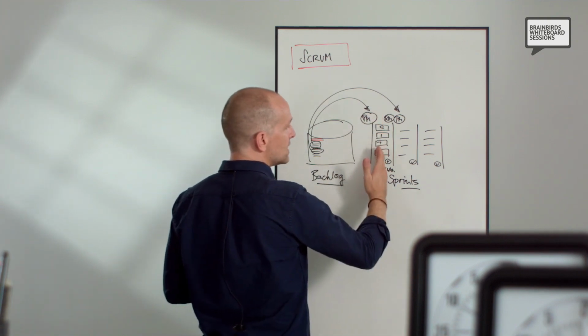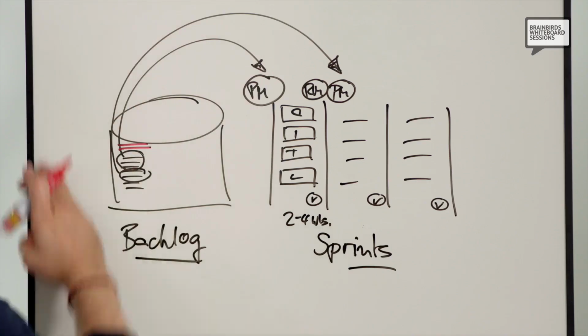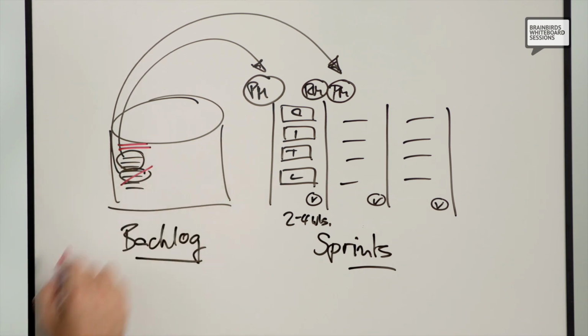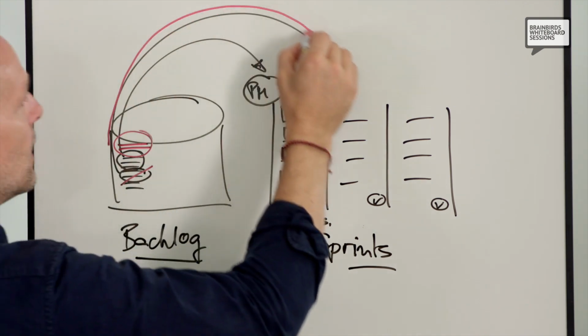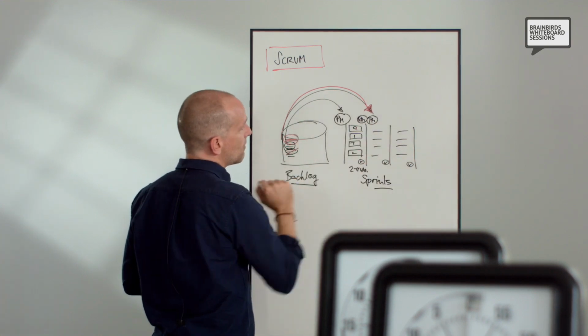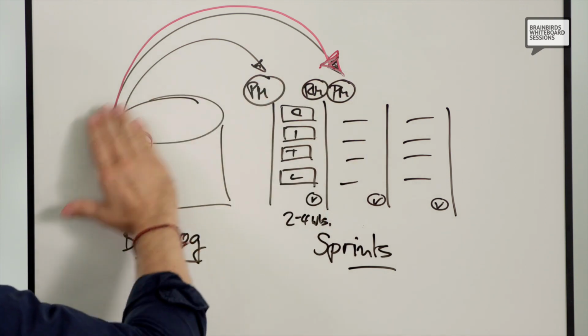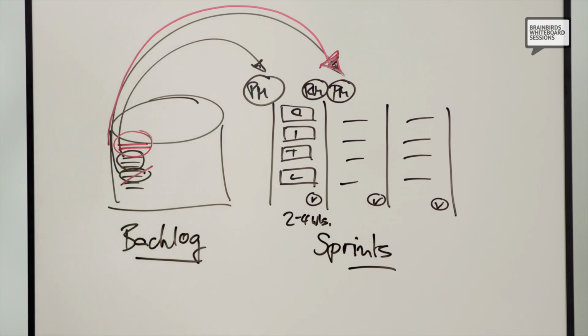And we would finalize the current sprint, but as soon as we would do the next planning meeting, we would review the scope of the backlog and, rather than doing what we had initially planned, we would pull the new features and implement these in the following sprint. So the advantage of Scrum as a methodology is that we can pull within our planning meeting from our backlog based on the business value and the capacity we have as a team. And we can flexibly adapt to requirements.